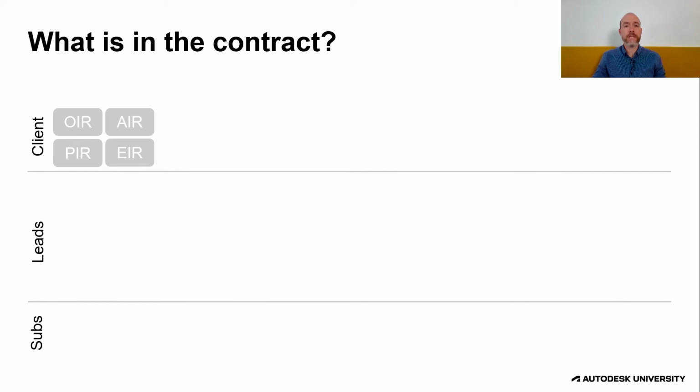And it's important to understand this, because we've worked on projects where people have said, we want BIM, and then we start doing BIM, but then they say, well, can we get this out of it? And then we say, well, you didn't ask for that up front, so it'll be an extra, and then the client's unhappy.